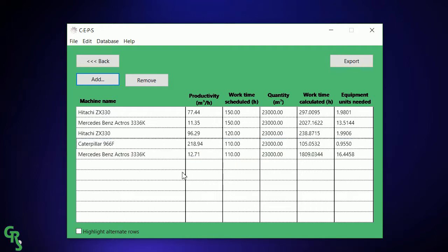Okay, so that's it. Now notice that the previous plan was supposed to have the duration of 15 days, because it's 15 days, 10 hours a day, that's 150 hours. And this plan, the second plan, will have the duration of 120 work hours, which is 12 days. All right. Now we will use this to calculate the costs of each of these plans.